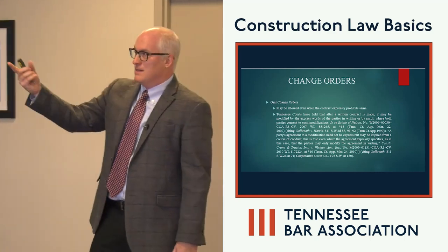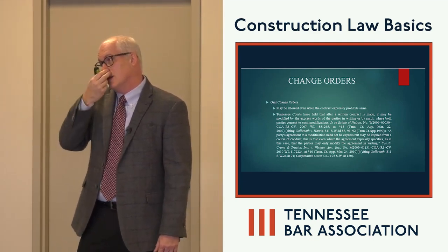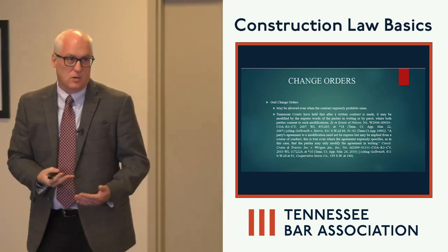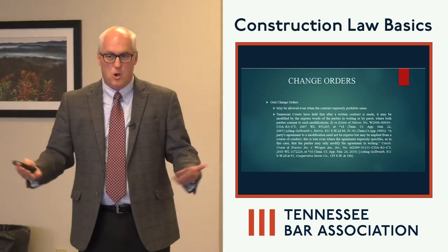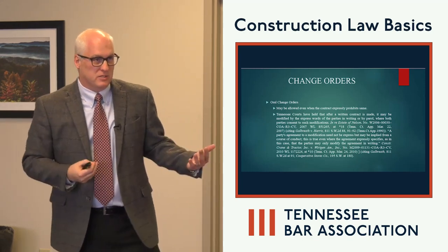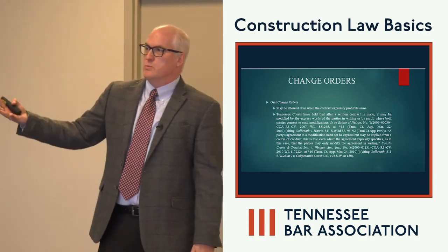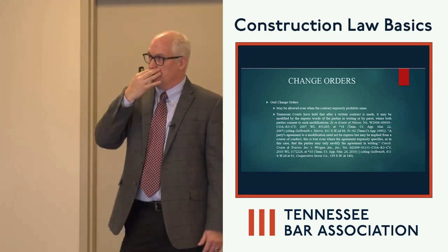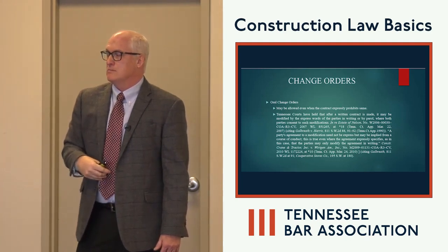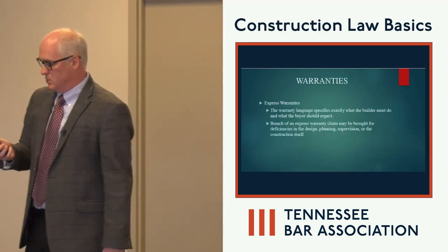And so these are some of the cases that I pulled. I think it's pretty clear that the court's not going to let, in this case, an owner sit there and watch a $20,000 hardwood flooring installation go down and just stand by and then try to take the position later that we didn't sign a change order for it. So even though change orders should be in writing, I think there's some protection there. Again, very fact-specific analysis, but there's some case law out there that's going to protect the contractor, for example, in that situation.